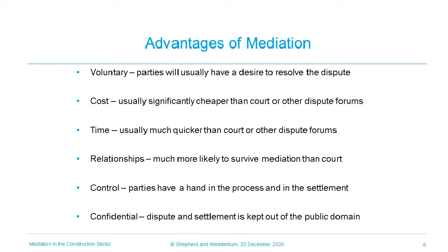Specialist mediators are often experienced dispute practitioners and parties can expect to pay between £3,000 and £8,000 a day for their services, depending on the level of experience and the number of parties involved. This is usually payable equally between the parties up front and is likely to be a fairly proportionate cost when considered in terms of each party's internal costs in a reasonable sized dispute. This makes mediation an easy sell to both parties. Why not attempt mediation when there is, relatively speaking, so little to lose?